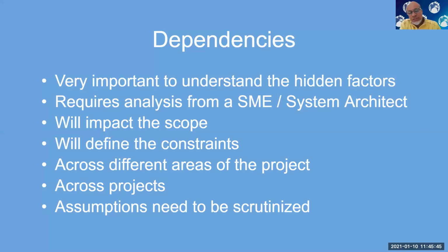Yeah, the turnover starts when you close your project and give your client, whether it's an internal client or an external one, deliverables so that they can start using it. Even with small projects, there could be a turnover. It might not be as involved. It could be short, maybe 15 minutes, but there is that step. Someone is turning over something to another group of people to take care of it from that point on.